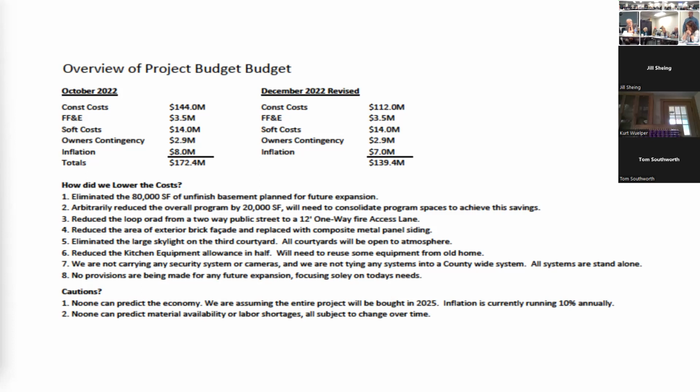It says off-site impact fees, $500,000. It's rolled into that whole number: the utilities, the water main coming in, the sewer main coming in. The impact fees are a separate line item, like $500,000. It's an allowance that we've talked through, but we haven't actually gone to Dover to talk about it. Every county that I've been involved with has dealt with this in different ways. Let me interrupt, I'm trying to figure out what impact fees these are. Is this impact fees to the city of Dover for building something?